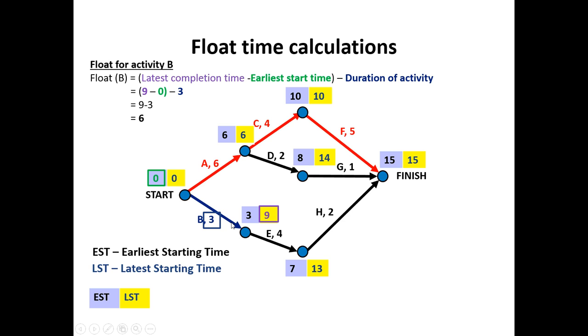The float activity for B, which is not on the critical path, we take the latest completion time, which is a nine. And from that we take the earlier starting time, which is a zero. So a nine take zero gives me nine. And then from that value, we subtract the duration of the activity. So it's nine. Take zero is nine. Take three gives me a float time of six. That means we can complete this task in the first three minutes and then sit and have a break, a coffee, relax for the next six minutes. Because the latest completion time or the latest starting time for the next activity is nine minutes. We only need three to get the job done.